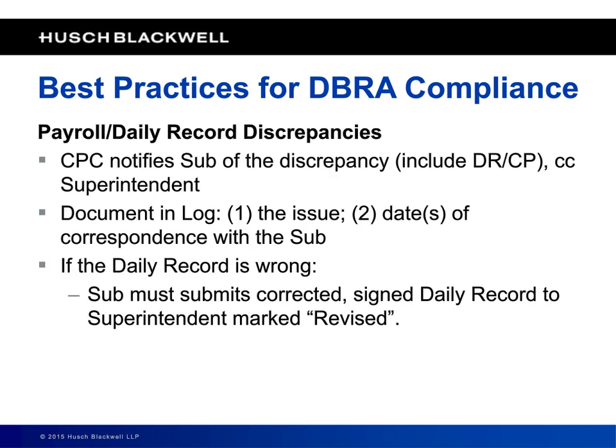So that certified payroll clerk is going to have the primary responsibility for communicating with the subcontractors regarding any discrepancies. Document the issue in the log. Document the dates that you had communications with the subcontractor about it. If it's just a phone call, record: had phone call with sub this day.